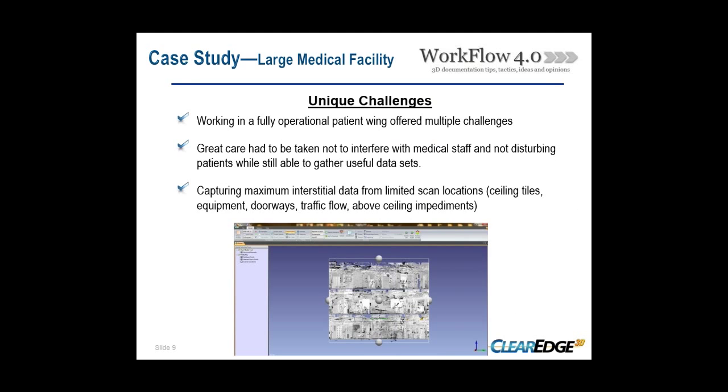Okay, some of the challenges. I've done a few of these hospital projects now, and they're all kind of unique. In the past, we've worked in cordoned off areas, which was a little different. We've had to work from containments, which offers another challenge altogether. This was different in that this was an operating facility that could not be interrupted. We did not have to use a containment in this case, but we were only allowed to remove 1 tile at a time. So we had to obviously take great care not to interfere with the staff, not disturb the patients. If we were told to move, we moved. We tried to operate around meal schedules and other things where we'd be interfering with the corridor itself.